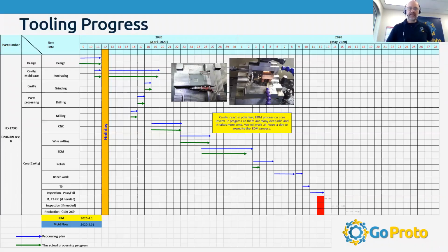At the beginning of the project, your mold components are chunks of steel. They don't really represent a very well understood progress in your tool. As soon as we get into recognizable things, generally within a week or so, we'll start to include pictures so that you see exactly where we are, exactly what process we're in, so that you can report back to your stakeholders so everyone knows exactly what's going on.